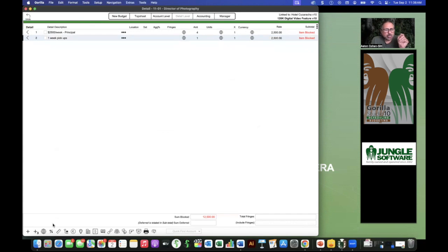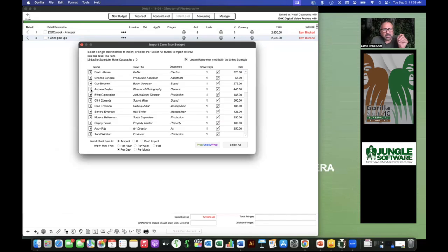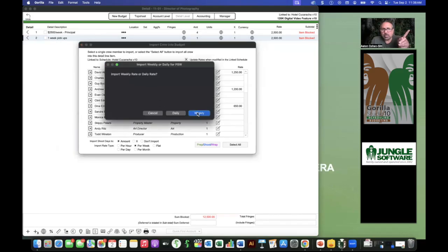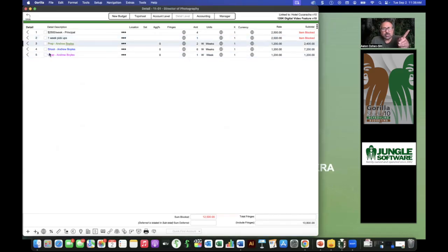I'm going to show you another way to do it. You can go back to the crew and click here. First of all, let me do the weekly rate, which is 1,200. Click here and do import into three lines, which is the prep, shoot, wrap, right? So what this is going to do is bring in Andrew Boyles. Now it overrides the shoot days in schedule because I'm using my prep, shoot, wrap in budgeting.